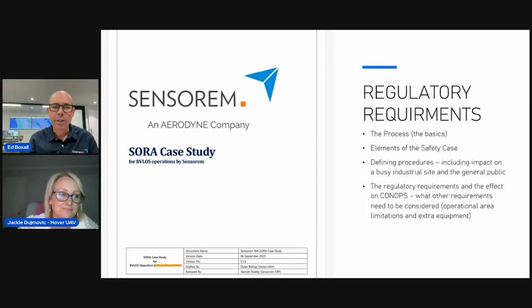I suppose the other thing, as far as the sites go, we looked at some of these areas and they looked like they were in the middle of nowhere. We saw an airstrip that didn't look like anyone was going to be landing there. It was pretty overgrown with grass. So there was research that went into finding out who lands at these airstrips. You can't put someone there just for 12 months and hope that you'll find that one person that uses that airstrip. So it's about doing a lot of research with local authorities and councils, people that maintain those airstrips, to ask who comes in here and how often, to make sure the regulator was happy that we'd done enough research and had a very good understanding of what was going on. How often does the local park get used by sporting teams that's really close to the site? Those sorts of things.